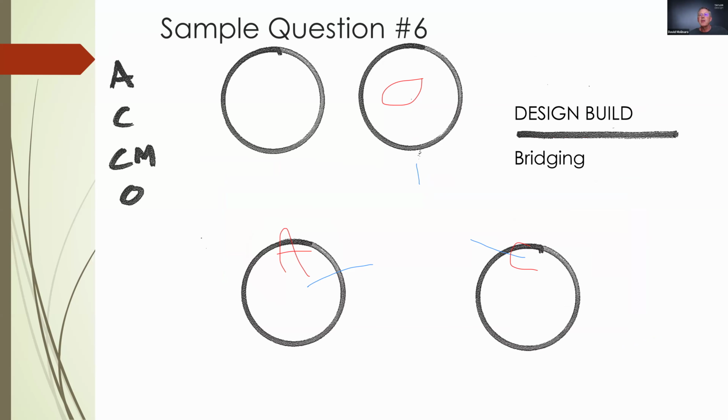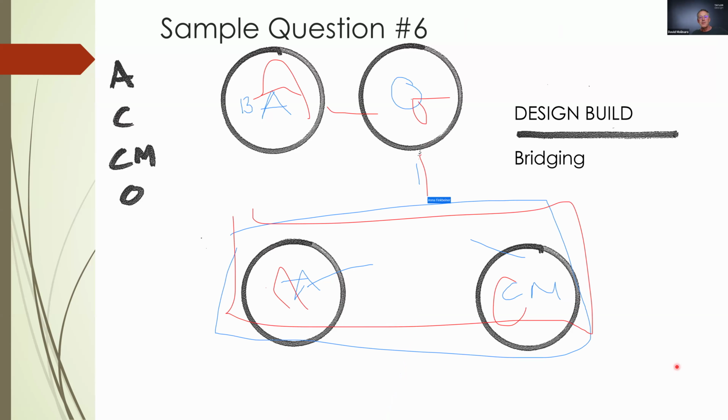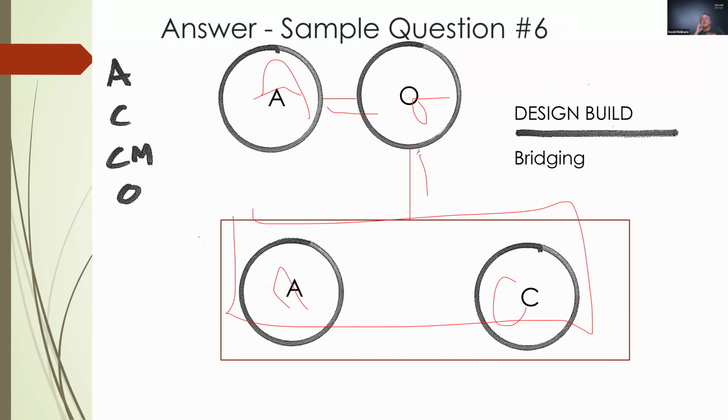Let's see, kind of one of the final ones. I think we got one or two more questions before we get into the second objective. So bridging design build. In this one, it's a variation on the design build, in which the project team includes both a design architect who establishes the design and then a production architect who determines the technical criteria and generates the CDs. So it's a little bit different animal. And we need one more contract line. There you go. Exactly. So we got a contract between the owner and the design architect, and then a contract between the production architect contractor group.